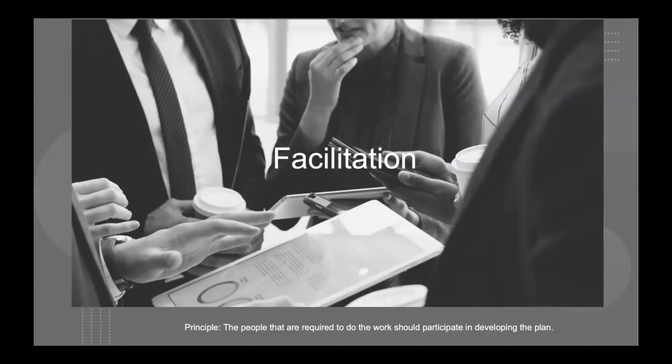First thing you need to know is that a project manager does not develop a project plan for the group. That's the first thing you need to know about project management, that they do not develop the plan for the group, right? That's not a project manager's job. But the general rule here that we want to look at in facilitation is that people that are required to do the work should participate in developing the plan. You know, that just makes sense, right? The people that are doing the work need to be at the table of sorts, in another way of saying it. And there's two reasons for this.